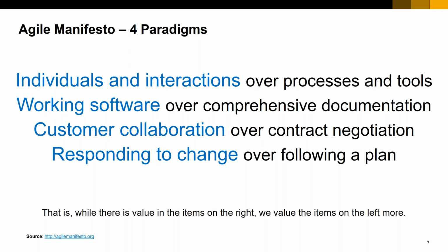So does it make sense for us to still go ahead and keep developing the features that we had already planned? We didn't do that, right? What we did is we immediately called off the development. We took some time and looked at as many details as we could get. Because when a big company takes over another company, there are some legal things to be sorted out before you can actually see what exactly they are developing.